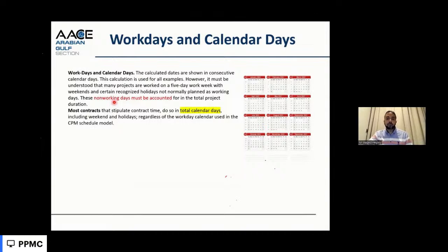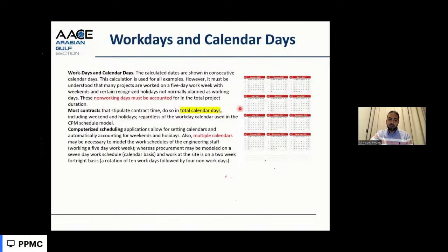And sometimes it is very critical in short duration projects, when they sign a contract with calendar days and there are many vacations coming in this short duration. It is like a 4 month contract and there are vacations of 3-4 weeks in between. So it will be very critical and should be considered while signing the contract. And I encountered this in design contracts. It was very challenging.